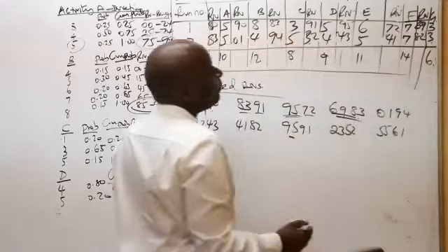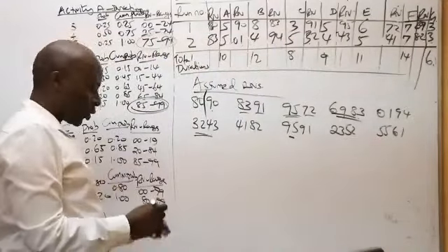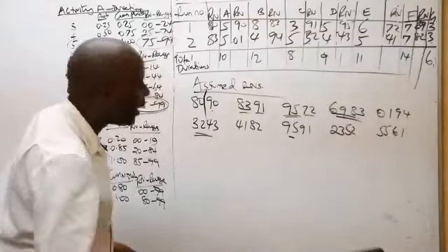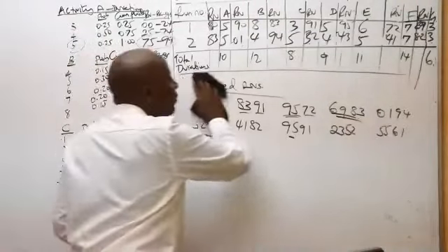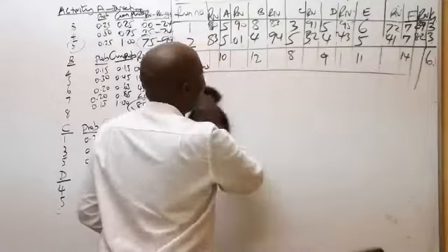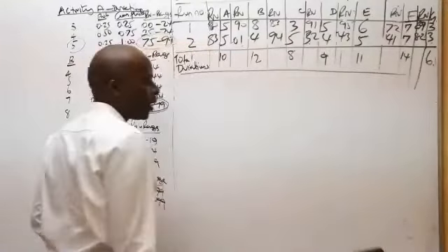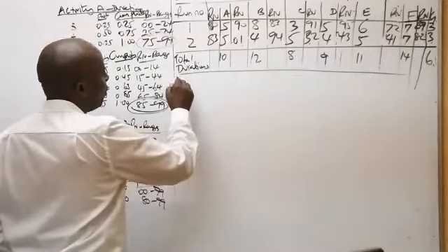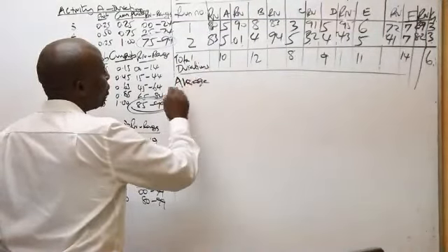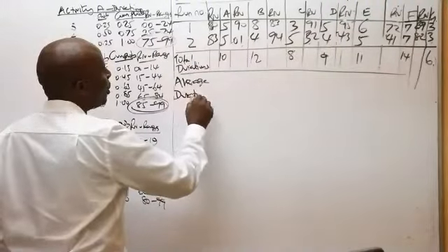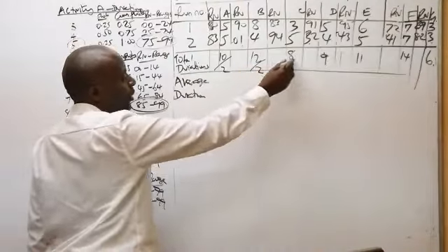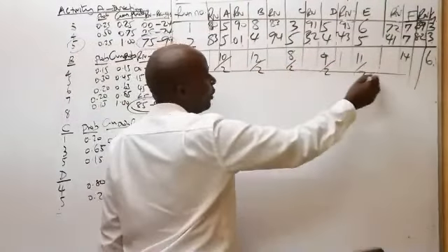6, like that. Of course, at the end of the day, you want the averages. You want the average duration. So come and give me another row for average duration. Take this and divide by 2 runs. All of them, you divide by 2.